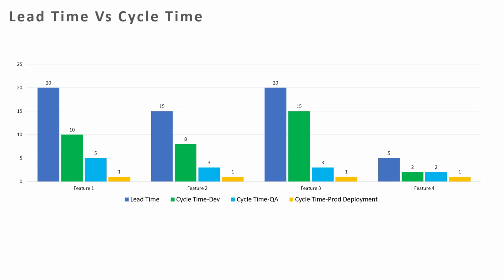And if you observe the differences in development effort between feature 1 and feature 2, 10 and 8 days. Here it took 10 days and here it took 8 days. So what is the reason for the reduction in development effort? Did we improve ourselves, or is the feature itself less complex? You have to understand that. For features of the same estimate size, where development effort still took less, you have to implement the same for the next features as well, so that you can improve development efficiency.